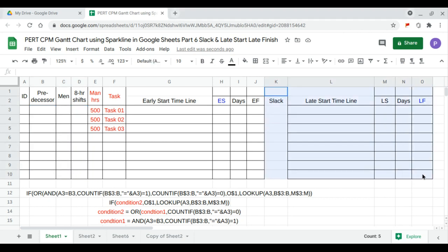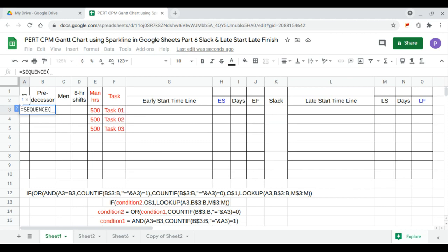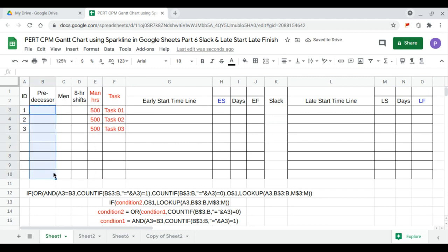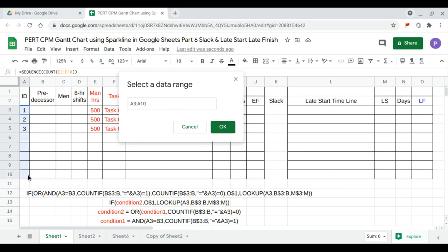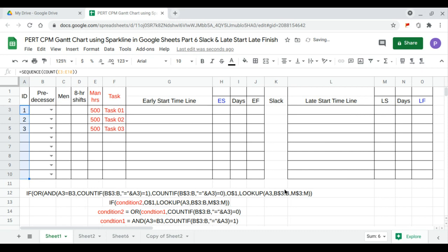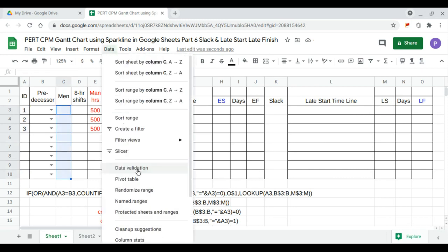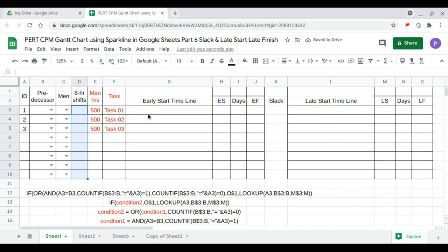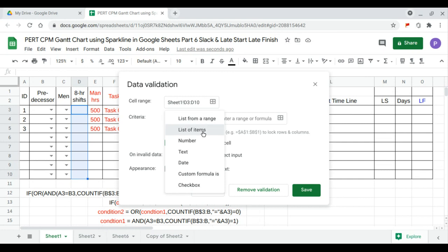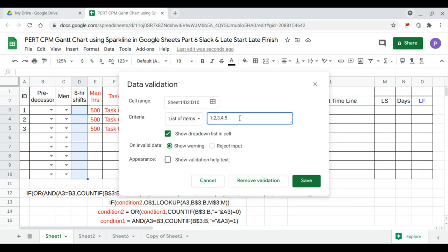This video will show the slack and late start timeline information. We begin with the ID, which is equal to a sequence count of man-hours and the predecessor. Data validation is applied over the ID range. We can assign a maximum of five men per task, and there are three shifts in a day — shifts one, two, and three.